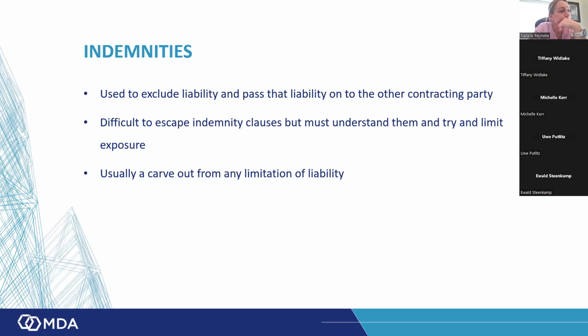They are forcing the contracting companies to come in at a low rate and ignore the definite liability even before the contract. The project quantity survey should actually include costs in the project cost, but nobody is trained in that. So what we're trying to get to the main developers, companies, investors and banks to see is: listen, it's not a maybe, it's a 100% threat assessment, it's there. So preparation needs to be in it, even when you are preparing a tender.